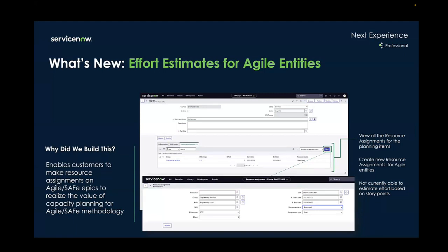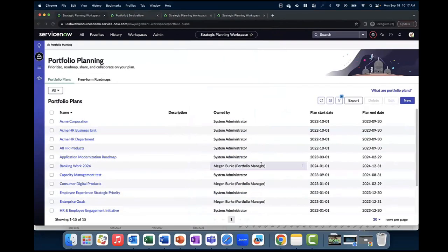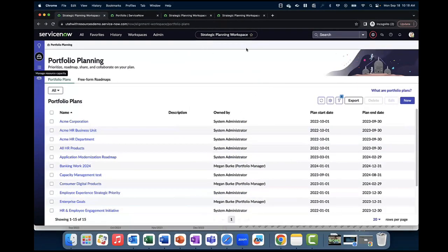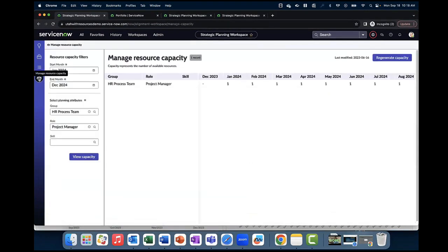Now let's jump into a quick demo of our capacity planning feature. You'll see here that we are in our strategic planning workspace, and in order to determine the supply of available resources to do the work, users can click on the manage resource capacity icon on the left-hand side menu and generate capacity planning tables for a defined workforce for a specific period of time. This report shows us the number of workers in terms of FTE that meet the filter criteria in this time frame.